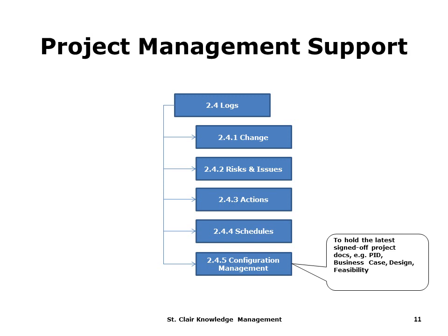So you may have in here a simple register that says, for instance, business case. And then if they click on a hyperlink, that takes them to the location of that business case, the latest one. And you could do the same thing for your PID, for your design, your feasibility papers, basically all the documents which are important to you and important to your sponsors. Okay, because there will be a time on a big project that you're not sure where things are, where the latest versions of things are, and by logging them in here, that will prove really, really helpful. Okay, so this aids version control.